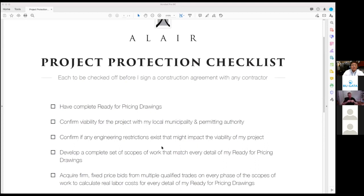Now, an accessory dwelling unit is hugely popular here in Arlington right now because of what Arlington County has done and because people are at home and are looking for more space. In general, you can do accessory dwelling units in two different ways. They can be separate structures, or they can be a part of your existing house. If they're a part of your existing house, they have to have their own entrance. They also have to be all up to date with all current requirements.